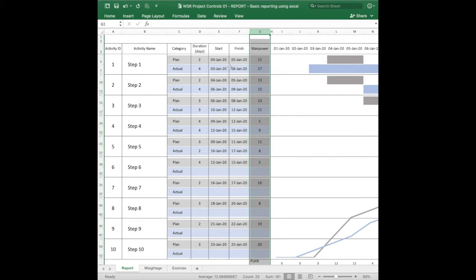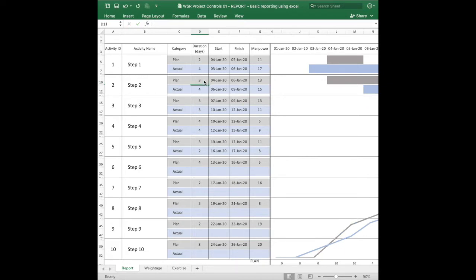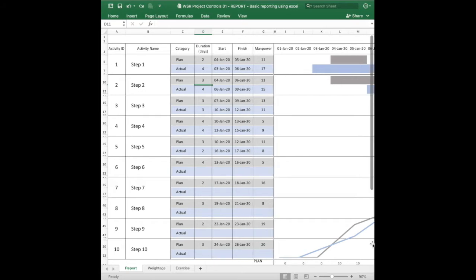So my start and finish dates are dependent on the duration, meaning that if I change the duration, the date changes. So I'll give you an example. If I change the 3, then it switched from 5th to 6th of January. Yeah, you can do it the other way around as well. Make the duration dependent on the dates. It's really up to what you want or where you're comfortable with. Yeah. Next is our Gantt chart.